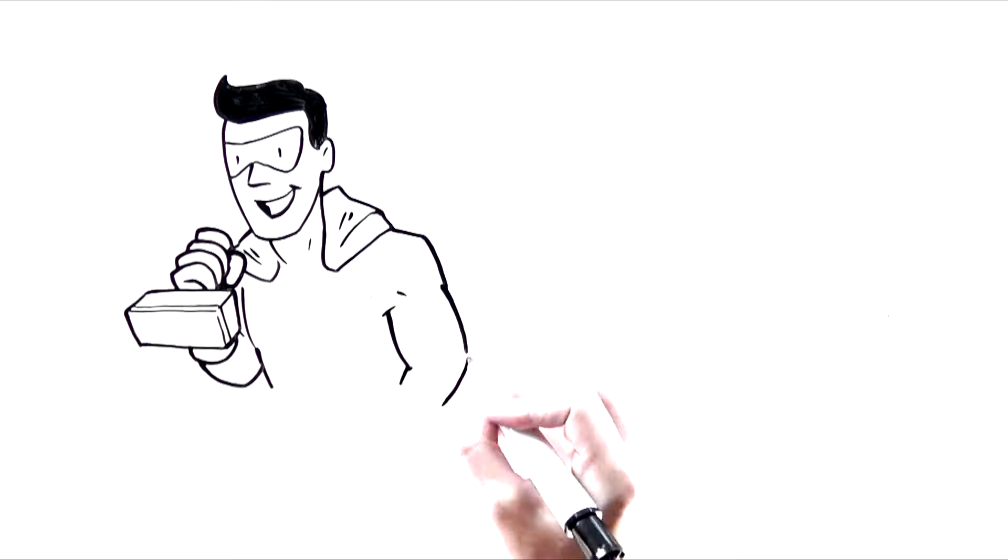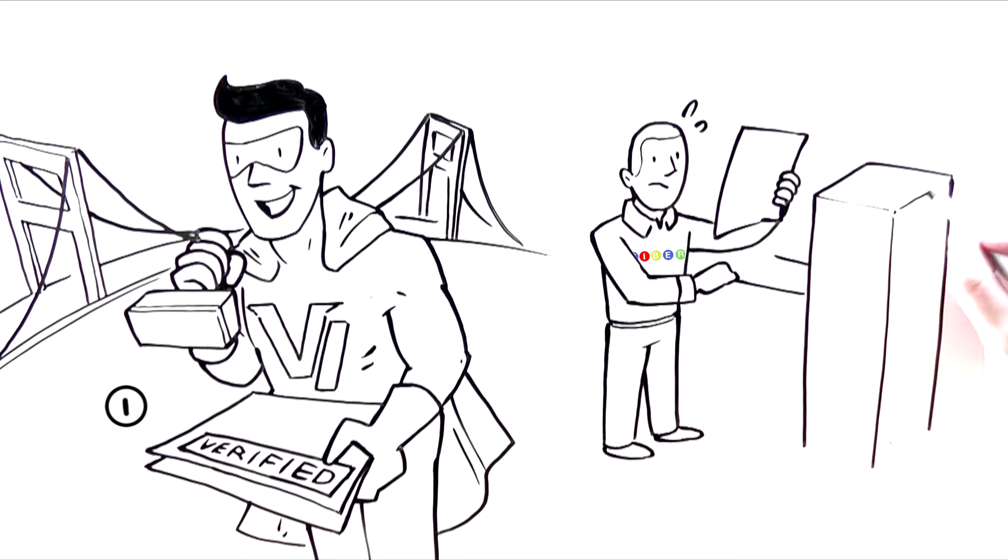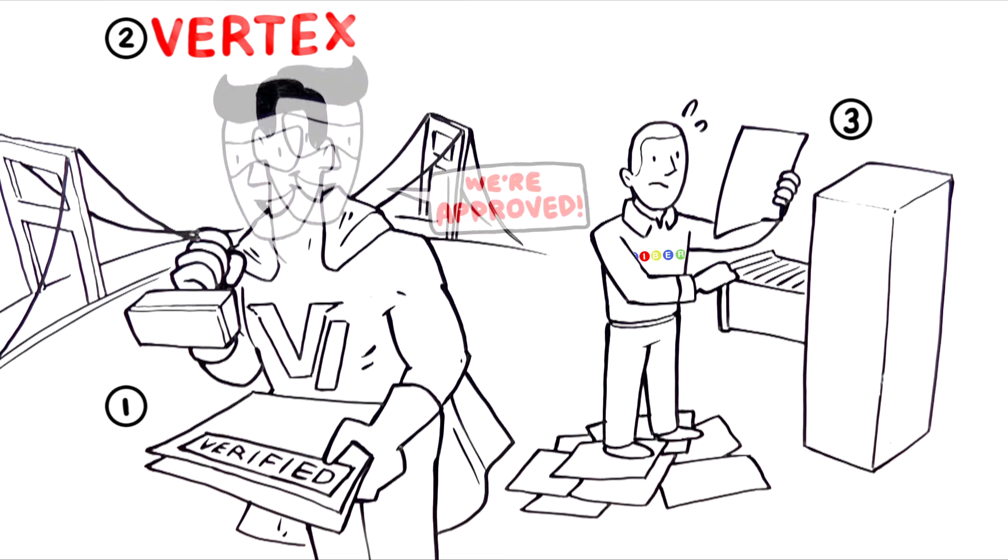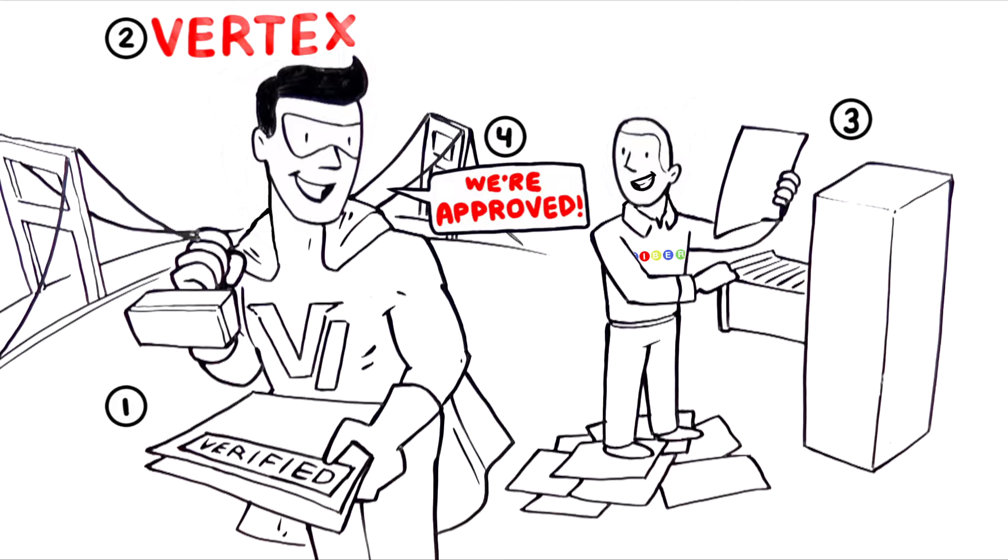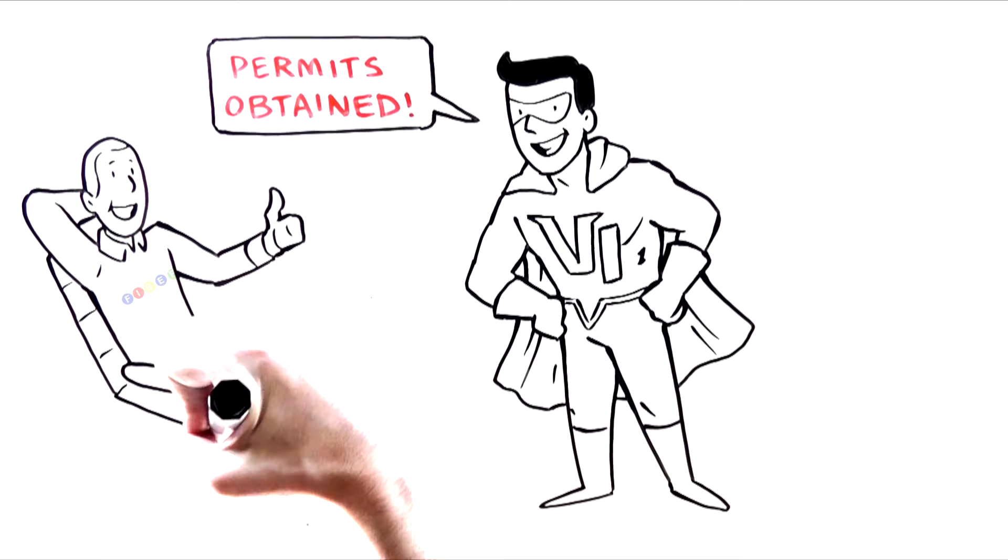Before construction can begin, all permits are verified and approved. This process can be especially painful if not managed by Vertex. Municipality permit offices do not have the capacity necessary to deliver efficient and sometimes not even accurate documentation. Vertex will confirm that all permits are obtained without any hassle to the fiber provider.